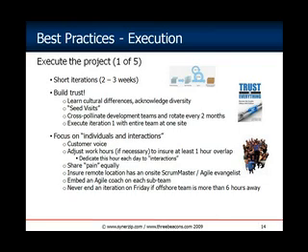It helps ensure that you see what the offshore team is doing on a regular basis, and you can give feedback and redirect them quickly if anything is amiss. It's a significant risk reducer. The worst thing you can do is basically ask the offshore team to give you the final product back in 6 months, and you basically won't get what you're looking for. So keeping tabs on them and getting in these short iterations is definitely the very best practice.